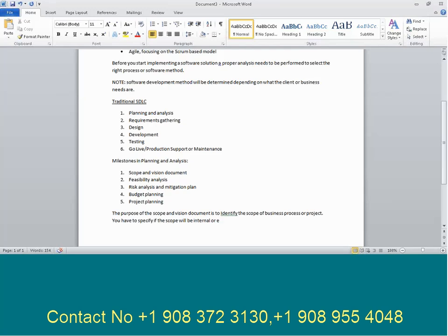Just if you are telling me that you are going to give me the funds transfer. However, if the scope of the project is only to develop internal funds transfer, I'm going to make it very clear that as part of funds transfer, internal transfers is in scope, in the sense whoever is trying to transfer within the bank, within the same organization, they will be able to transfer funds. However, external transfers outside the bank and international transfers are out of scope.